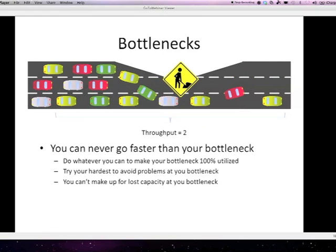So it's very important that you utilize your bottleneck to full capacity. So you should try your hardest to avoid problems in your bottleneck. And that means that, as I said before, maybe you help the people doing the bottleneck work to do things they don't really have to do. It's very important to keep them busy all the time. So most of the time you will try to create some kind of buffer in front of the bottleneck. So you will never go down below 100% utilization. And this is very important because if you lose capacity at your bottleneck, it's more or less impossible to get that back for the time period. Then you need to grow the capacity of that bottleneck quite a bit more. Because every minute that you lose at the bottleneck will be lost forever for this process.